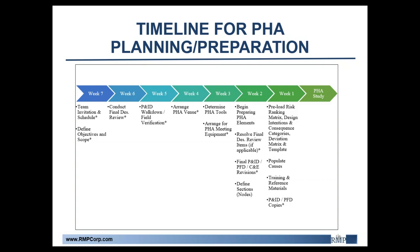In week six, you want to conduct final design reviews, especially for capital projects — you want to make sure you have the most up-to-date version of what you're planning going into the HAZOP study. For week five, we recommend doing a P&ID walk-down and field verification. This is such an important step for operating facilities because if you're not working off the most up-to-date P&IDs, you might be missing some major potential hazards that are actually out there in the field but not written down on paper.